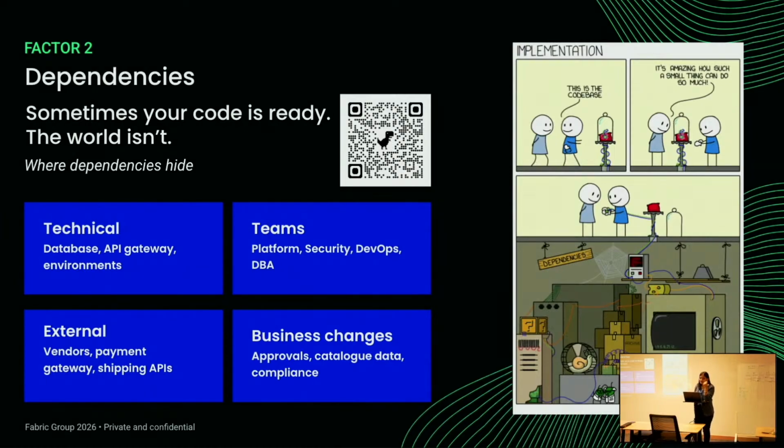The last thing is external parties. Payment gateway, I think we talked about. There are also vendor teams you sometimes need to work with. In that case, what's their speed? Say, for example, you are an API aggregator and you need to work with a lot of different teams. If your input depends on the output of other teams, what does that plan look like? And how do we shuffle our tasks or items in the whole plan to sync with the order in which they are delivering? I think those are some very important factors as well.